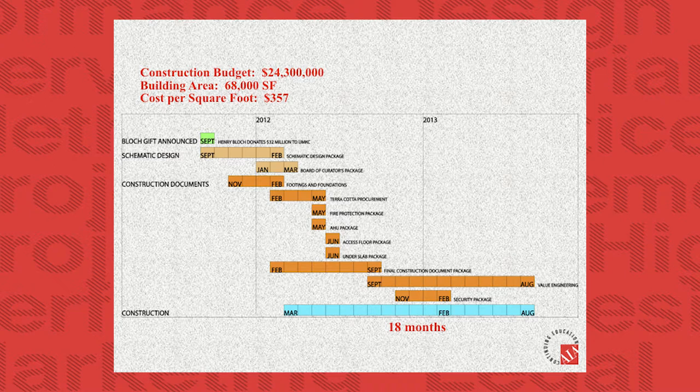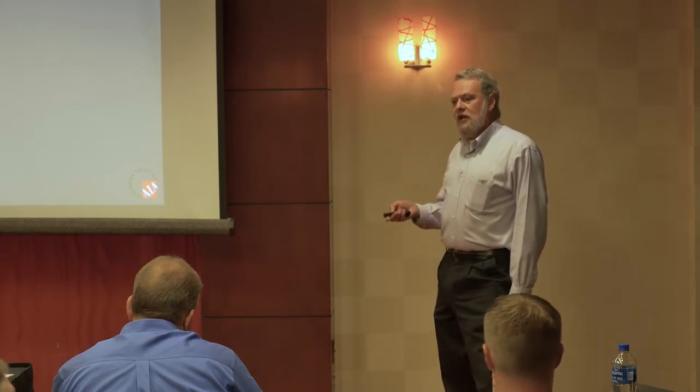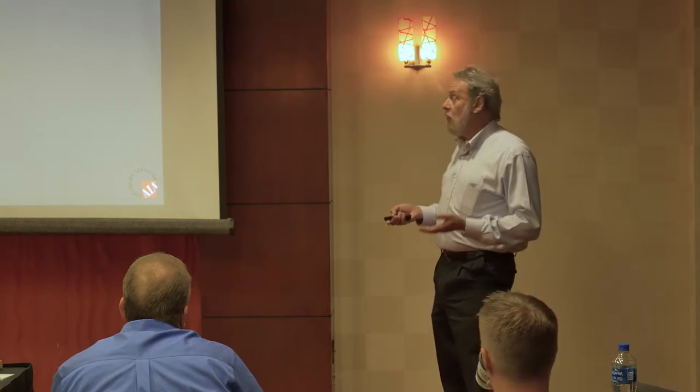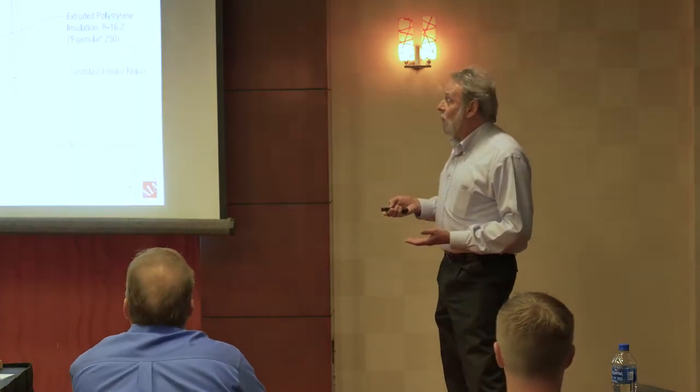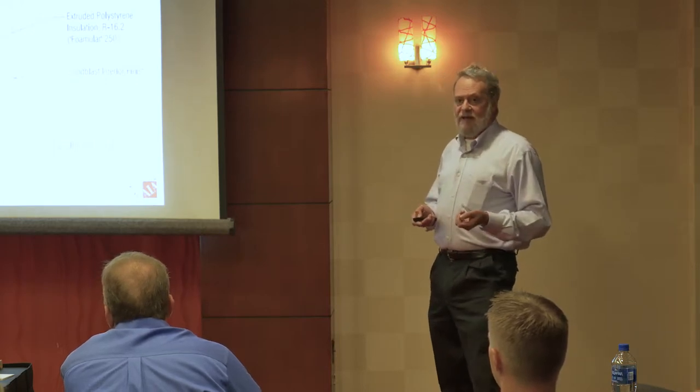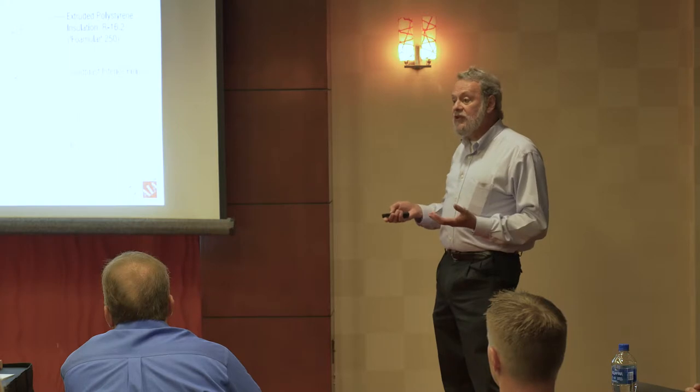So that's when, in brainstorming with J.E. Dunn, one of the ways they wanted to get this done was to bring on as many associated subcontractors for design assist up front as they could. They were really pushing us to think about using precast because of the speed that goes with precast, as opposed to the system we wanted to do. They liked working with Enterprise and brought Enterprise on board. And thankfully, Enterprise, as Dirk said, was willing to work with us on the idea. They had never done this before, but they were willing to do it.